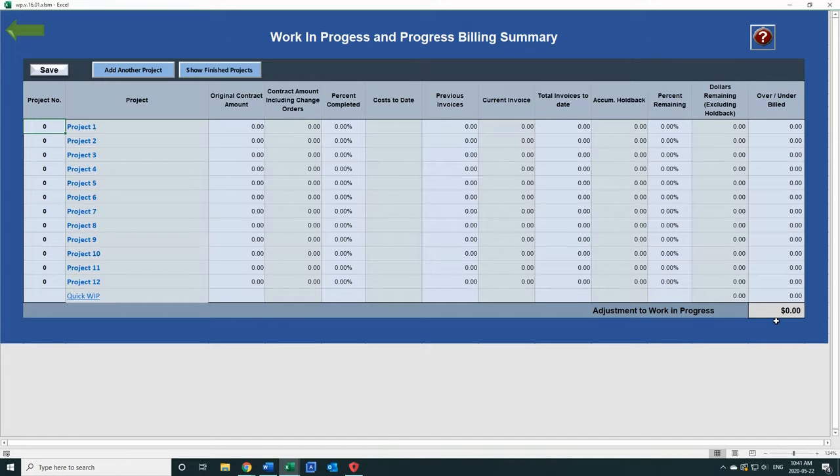Remember, anything you overbilled, it's not your money, it's still your client's money. Theoretically, possession is 9/10 of the law. I know, I understand that, but it is still theoretically and legally your client's money, like a deposit. Well, we don't pay tax on deposits, and hence we shouldn't be paying tax on overbilling. If you're underbilled, it also gives you a number here to increase your sales, so you now have the accurate number in your financial statement.